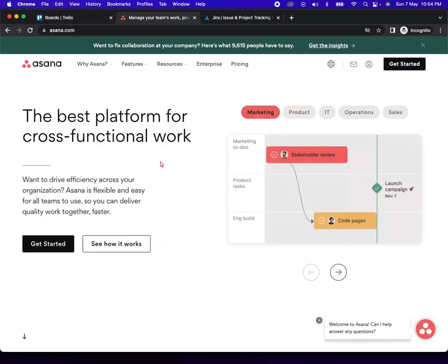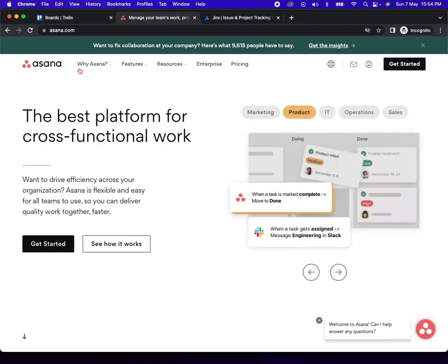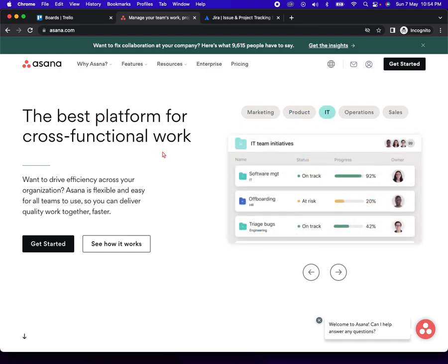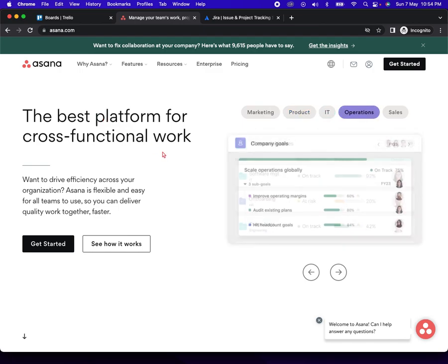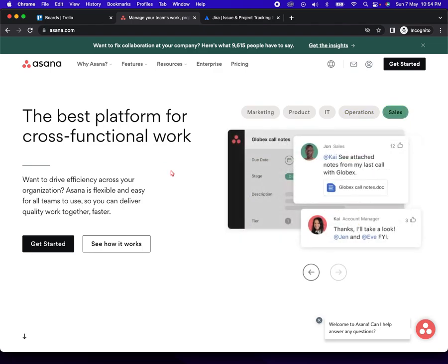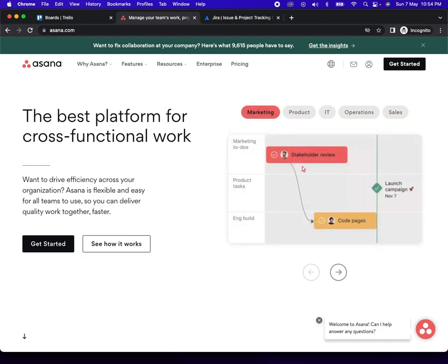There is another very amazing tool, the software Asana. Asana is similar to Trello as well, but it is much more comprehensive, providing you much more options. You can create tasks, connect those tasks from parent task to child task, and even create dependencies upon tasks. So one task won't start unless the task it depends on has been completed.